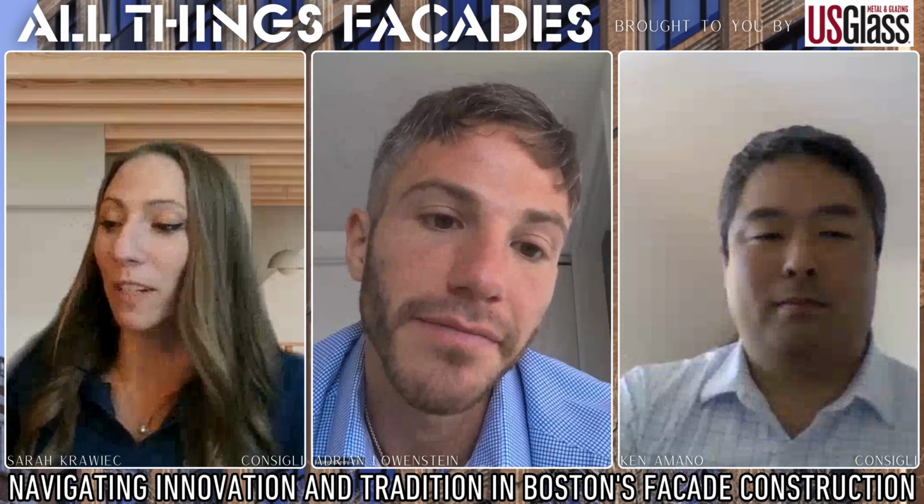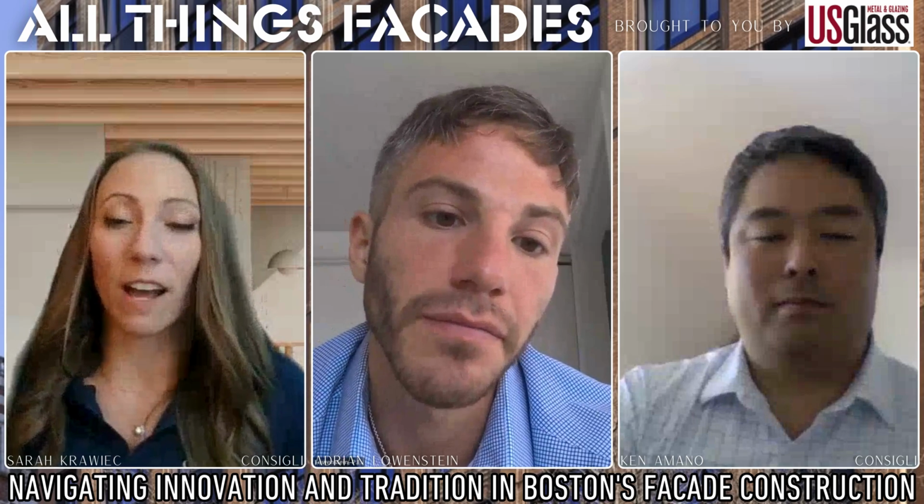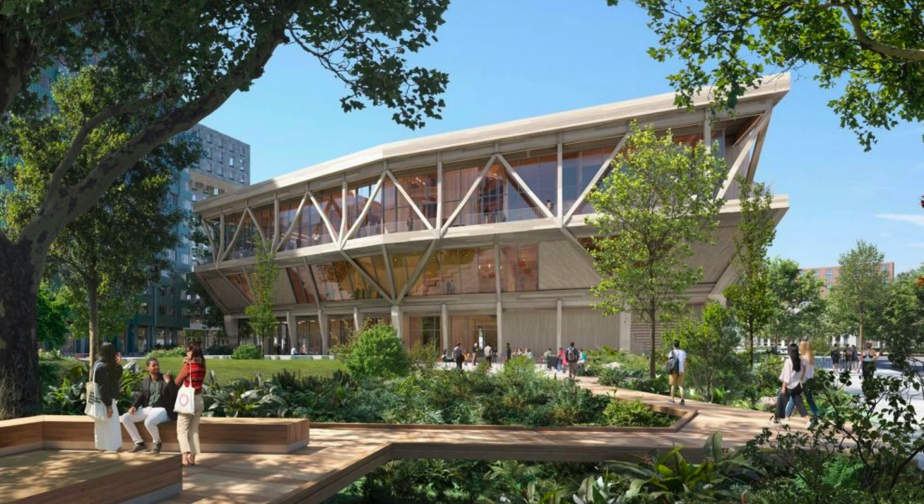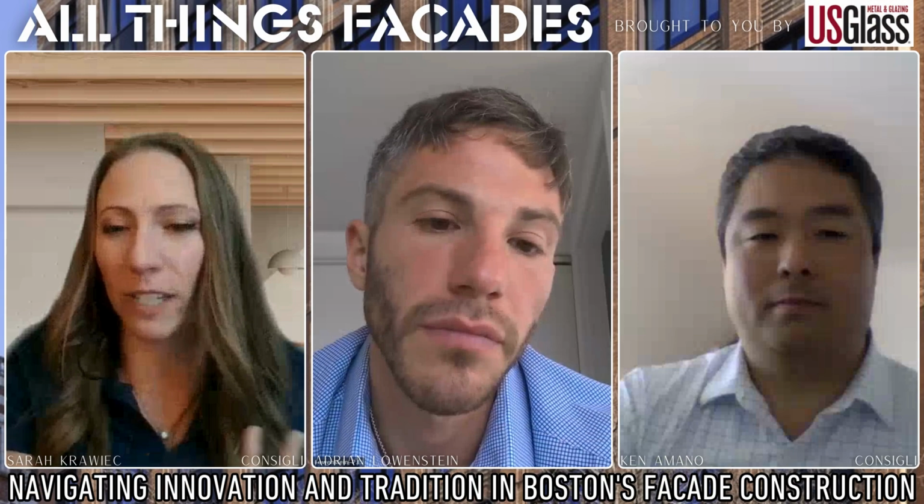To name a few, the biggest one is protection. And that is, how do we protect mass timber throughout install, right? This is a natural product. It naturally absorbs water, and it is going to be exposed to the elements. And specifically at Treehouse, we have sub-beams that are exposed from the interior, compared to other projects where perhaps it's 100% concealed, but there's still a structural integrity that we need to protect.